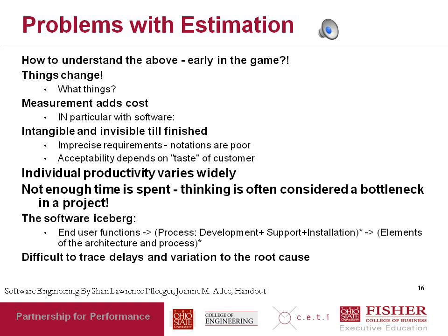And things change. So what things change? The features that might need to be added to a project may change. The people who you have on the project might change. Some might leave. New people might come on board. Things like that. Thirdly, any kind of measurement adds cost. So if you go through a planning session to estimate and measure how much work something might take, that in itself adds cost. And because software is complex, trying to get a sense of it in order to estimate it is going to add cost as well.